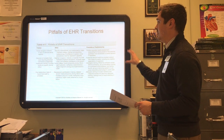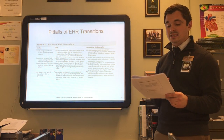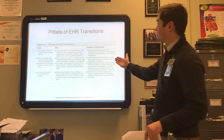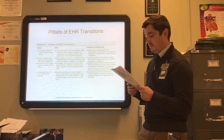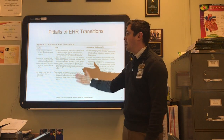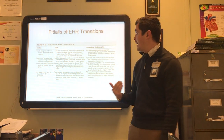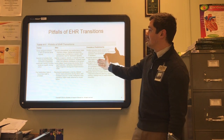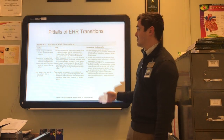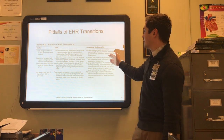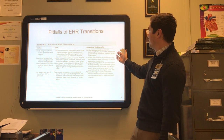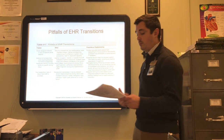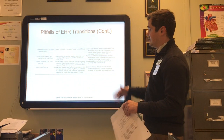Table 4-1 on page 91 of the textbook shows some common mistakes that medical offices make when transitioning to an EHR system and offers tips to avoid them. For example, a poorly designed software or lack of network server capacity can lead to security vulnerabilities, poor performance, implementation delays, crashes, downtime, and lower productivity. To prevent this, you should conduct an accurate needs assessment, account for future growth of the practice, and purchase more bandwidth or switch servers if necessary.